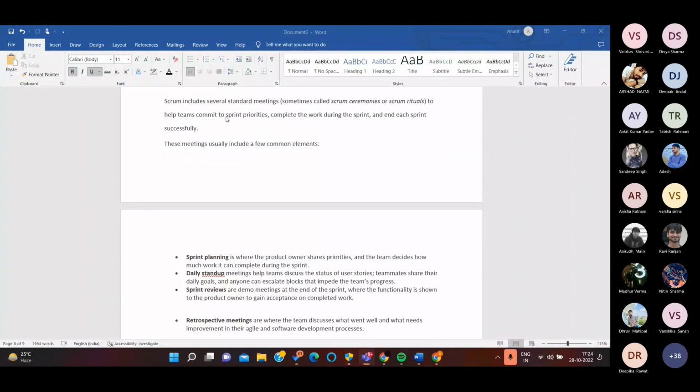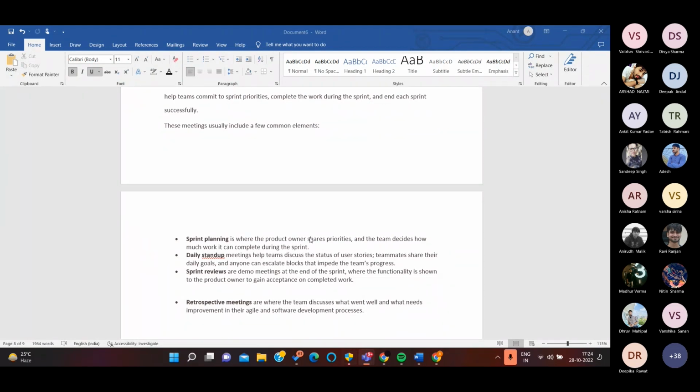And the most important thing that is often missed during the entire project management is the retrospective meeting. At the end of the entire sprint or milestone, there's always a retrospective meeting that comes into play, where it is discussed what all things went well and what can be implemented in the next sprint, what didn't go well and how it can be improved from the next sprint, where exactly the process lags in the entire sprint or the milestone. That is something that is often missed and often loses its purpose. So the retrospective meeting is something that really needs to be worked upon, I guess.